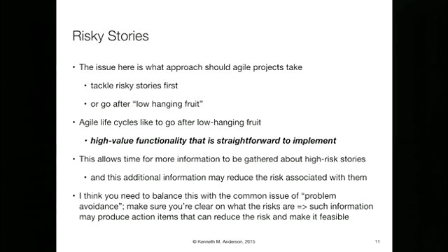So one of my tasks this week is going to be to spike on a technology I think will help. Or we're going to have to go meet with this other organization to understand their angle on the requirement so that we have more information. So as you do that, slowly but surely the high-risk story becomes less and less risky, so we have more and more knowledge about it. Oftentimes, the risk just comes from the fact that we don't know. We don't have enough information.